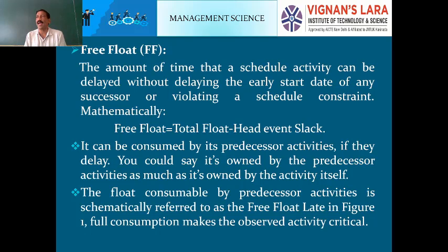Where the successor activity was not started within the scheduled time, this is a problem affected by the preceding activity. The float consumable by preceding activities is schematically referred to as the free float late in figure 1. That means the figure will be explained on the next page. Full consumption makes the observed activity critical.